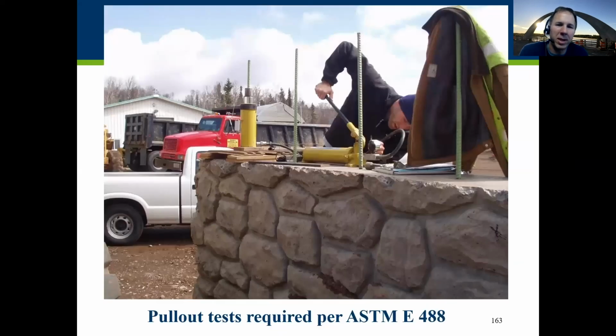So this is another pull test. Pull tests are required for all those rebar. They have to do it on a straight bar. It can't be a bent bar. So that is a challenge, in that we may have to install some sacrificial bars, but then they're the best install out there. So it's something that we work into the assumptions when we do the testing frequency rate.